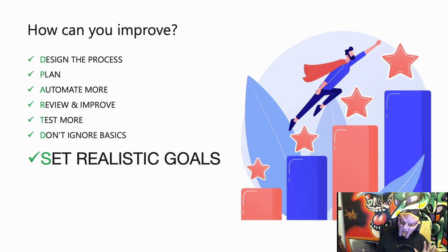And this is not just dev. This is for project managers, product owners, QA, scrum masters, etc. If we cram too much, like an 800-point sprint where the team is really only set up to do 100, your quality and your speed is going to suffer. And that negates the purpose of DevOps by definition.